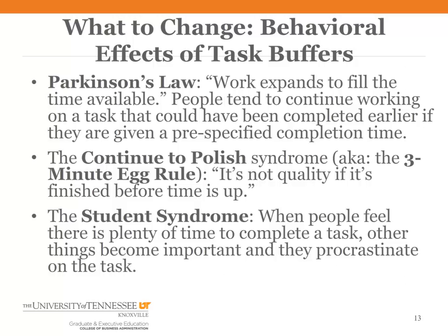When we allocate a task time of 8 weeks, even though the task could possibly have been completed in 2 or 3 or 4 or 5 or 6, whatever weeks, the 8 becomes a self-fulfilling prophecy. You're students and you know that. If a professor gives a 4-hour assignment that is due in 2 weeks, it will get done in 2 weeks. For the reasons shown here, people do not tend to complete tasks early.